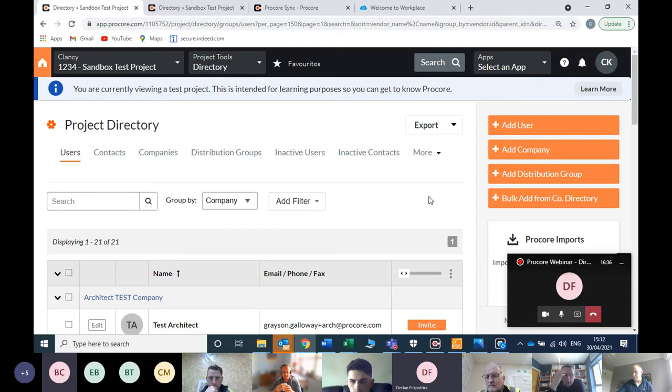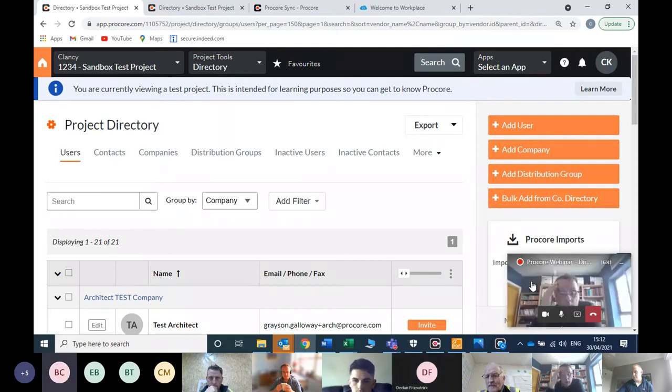Yeah. Can I ask a question now, lads? Brian, just because it was going around my head about that Excel directory. I suppose what I normally do is when a job is started, the first bit of direction in the Excel document, I set it up, say the design team and all that, and then on the roles and responsibilities, it's handed over to the QS, who, as the subcontractors have been appointed, adds in the names and emails of all the subcontractors being appointed.